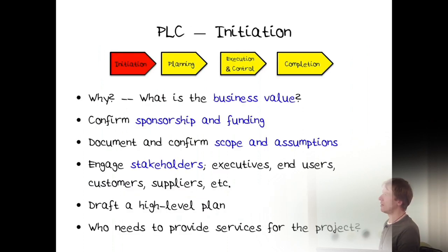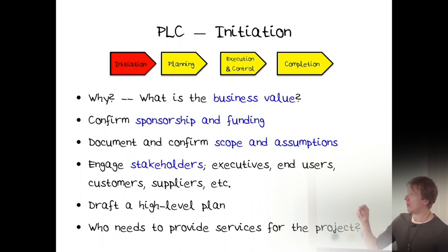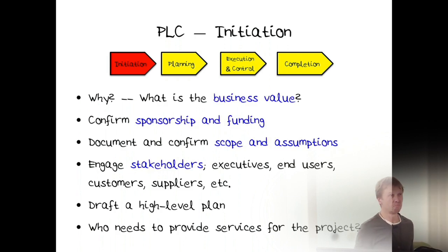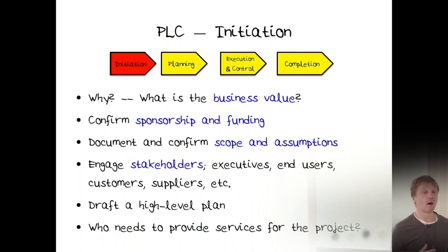So in the initiation, you ask the question, why is that? What's the business value of this? Because if there's no business value, you're not going to be allowed to do it, sadly. And the closer you can associate that business value with money, the higher the chances that the project is going to happen. If the intention is to improve employee morale, it's going to be way harder to sell it, because the money is an indirect effect of higher morale.